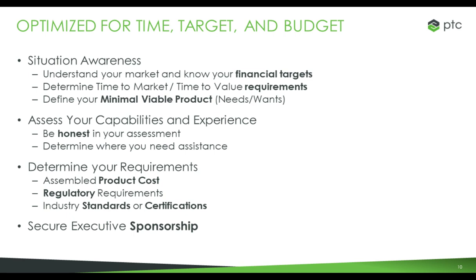Because these projects can be very expensive, and they can be a great place to learn, but companies aren't necessarily paying for you to learn on their dime with a project that fails. You hear fail fast, fail often. If you're going to fail on something, fail it in the conceptual design. Fail it in the market analysis space. Don't fail it when you get all the way down to a full functioning prototype that's designed for manufacturing and into your small runs manufacturing. Very expensive. Take that time ahead of time.